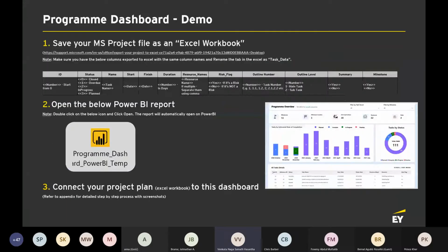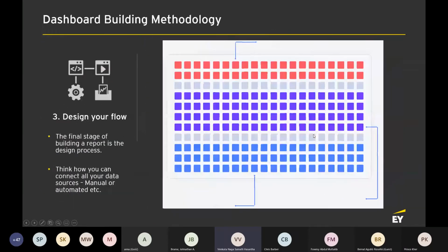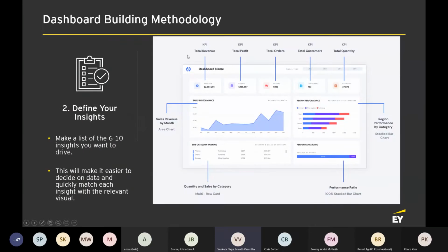Again, if we go back to our Microsoft Project example, let's say you need a regular update, another workaround is you can write a Power Automate flow to extract your project data into Excel, and then the Excel gets uploaded to SharePoint, and then you can easily configure regular updates from SharePoint to this Power BI dashboard. So think about the flow in this visual.